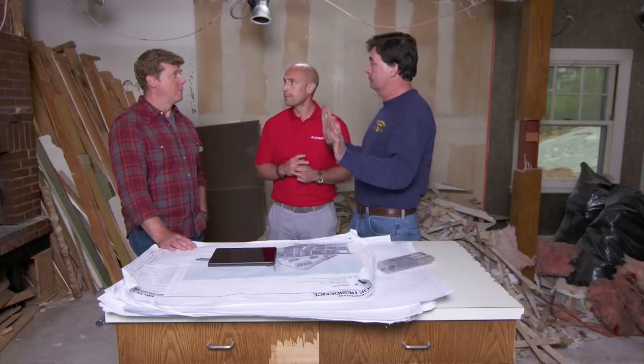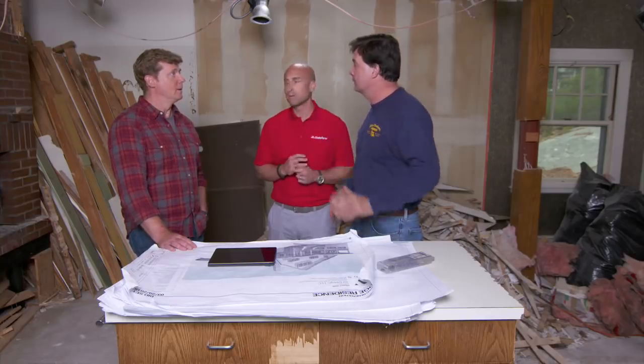So literally ask them, are they covered? Are they named? As I said, my plumber, I'm named on their policy, Silva Brothers, additionally insured on their policy. I require to see that certificate. So there's an insurance audit for that. You're telling me to ask the plumber? No, you ask the contractor. Ask the GC, and then he'll say, yeah, here are my subs' certificates if it makes you comfortable.